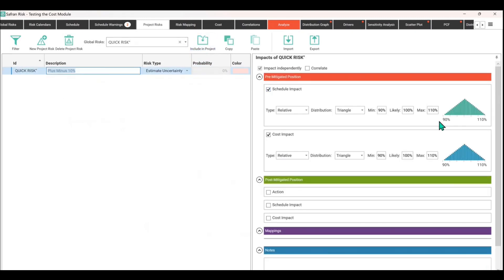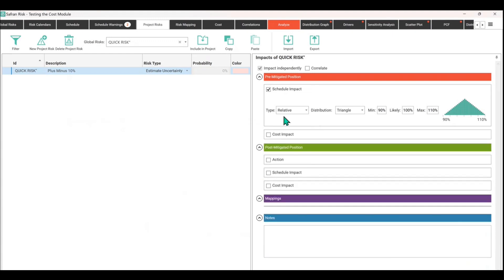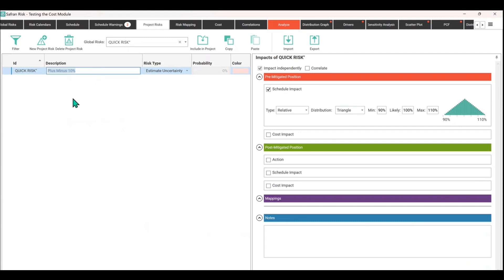It's just a preset, plus or minus 10 on both time and cost. I'm just going to toggle off the cost, I don't want it doing anything other than a schedule impact. Once you've brought it out of the library from the global risk register part of the database, once it's on the project level risk register, you can manipulate it and call it whatever you want.